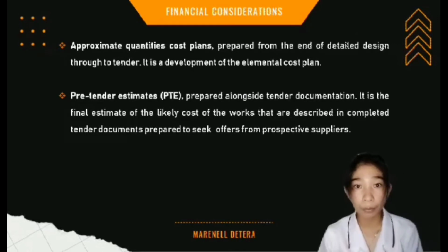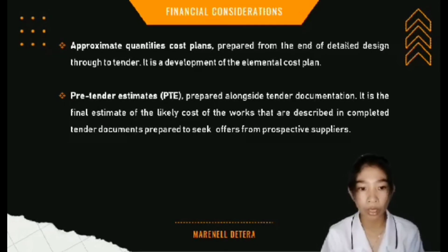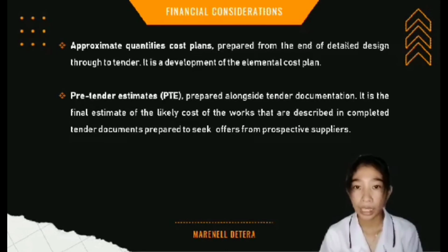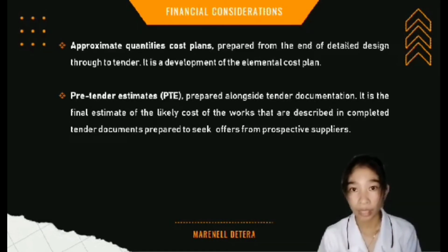The PTE provides a final comparison with the budget and along with the cash flow estimate enables the client to confirm that sufficient funds are available before committing to seeking tenders. And PTE also gives a basis for assessing and comparing tenders when they are returned.